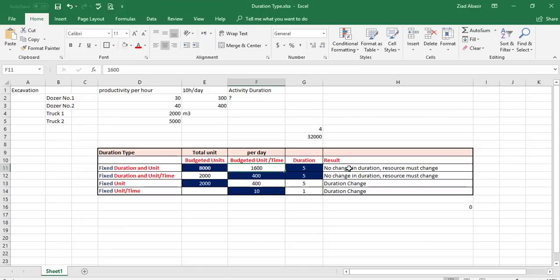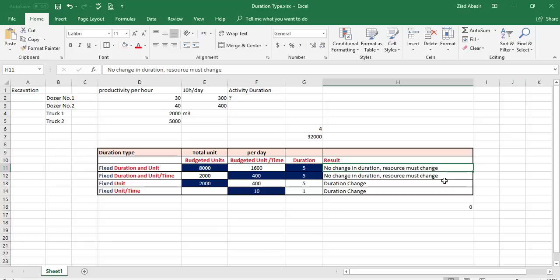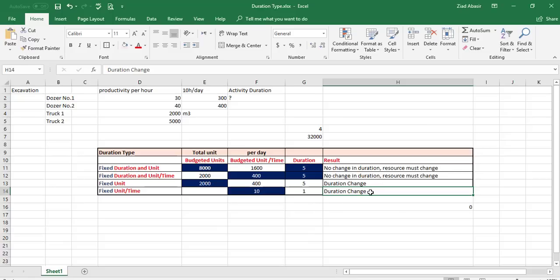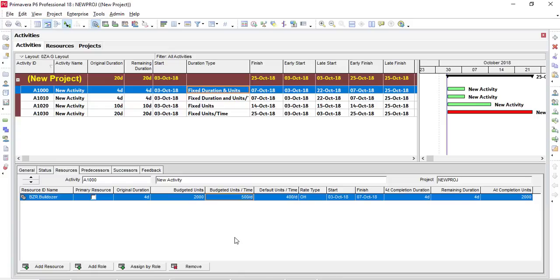To conclude: Fixed Duration and Units — no change in duration, resources must change. Fixed Units — duration changes based on resource availability and productivity rate. Fixed Unit Time — limited resources with fixed productivity define the final output duration. I hope this explanation of duration types was beneficial and easy to understand. Thank you for watching — please subscribe to follow us and get new content.